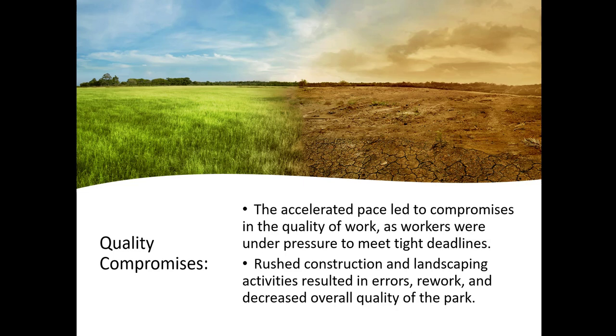Another thing that can happen, like I said before, is quality. The accelerated pace led to compromises in the quality of the work as workers were under pressure to meet tight deadlines. Rushed construction and landscaping activities resulted in errors, rework, and decreased overall quality of the park.